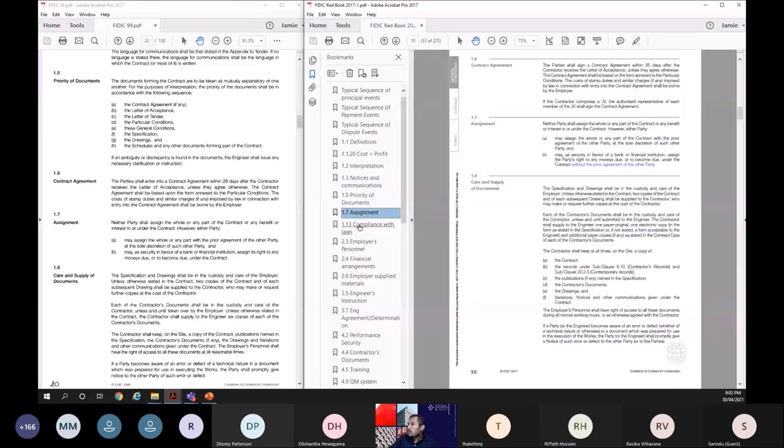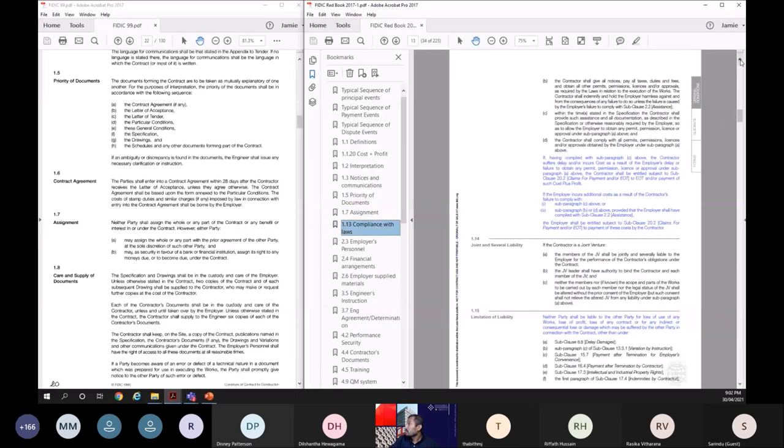Right. We discussed the priority of documents, assignment, and now compliance with laws. Compliance with laws is basically a new addition. Now, the contractor shall give all notices, pay all taxes, and obtain permits and permissions for the execution of the works. Usually, when permits are required for the execution of the works, the contractor should take them. But when permits are required for the design of the works, the employer should take them. So when the contractor is taking any permits, the employer should support the contractor. When the employer is taking any permit, the contractor should support. So it means supporting